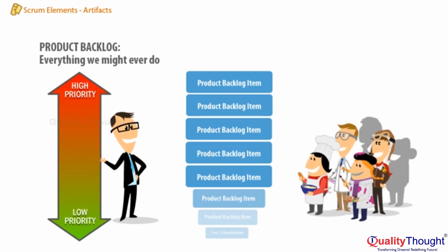Anyone can add items to the product backlog, but the product owner's got to prioritize them and the Scrum Master's got to make it visible. A well-formed product backlog does not contain tasks, only well-formed product backlog items, or PBIs, which might be written in user story form or maybe use case scenarios. Force ranked means there's only one thing in the top position. Getting organizations to do this is usually a breakthrough.